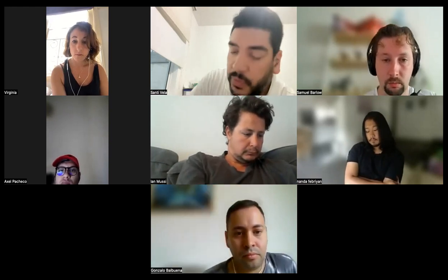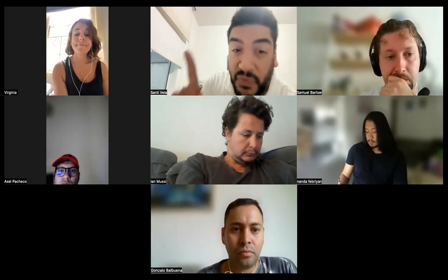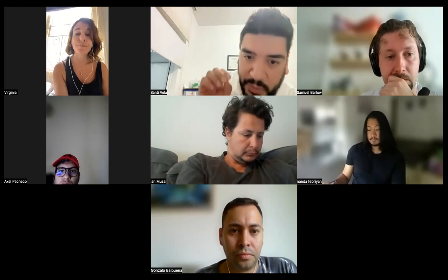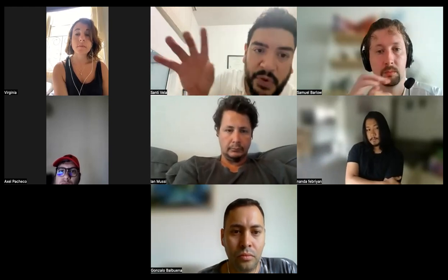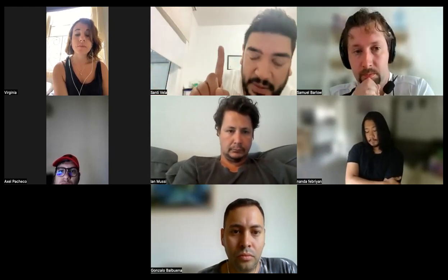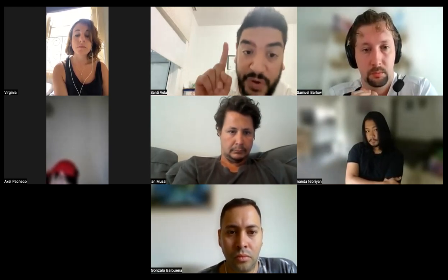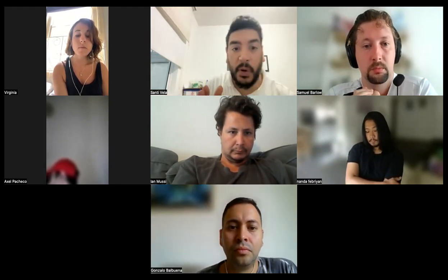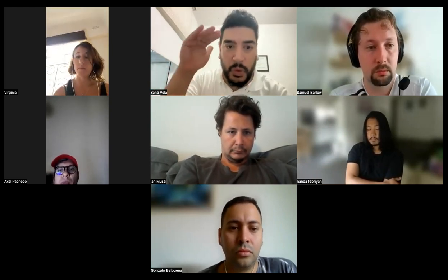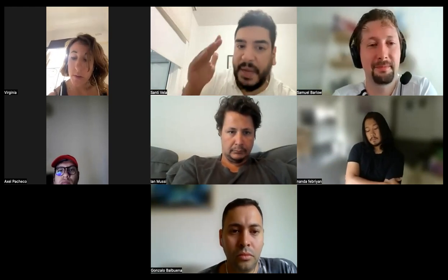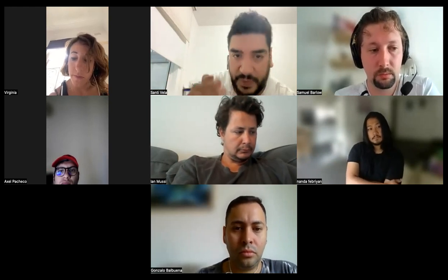Just to take advantage of what you have said, Gonzalo, remember, when we start a project, we finish projects, all right? When we start in project management, that is extremely important. It's one of the project management principles. When we start a project, we finish a project. But there is just one reason why we stop a project. And that reason is when a risk in our risk register is pointing directly to the project goal. All right? So when you do the risk register, you will have many risks, probably hundreds of them. But the vast majority of them will be pointing to activities.